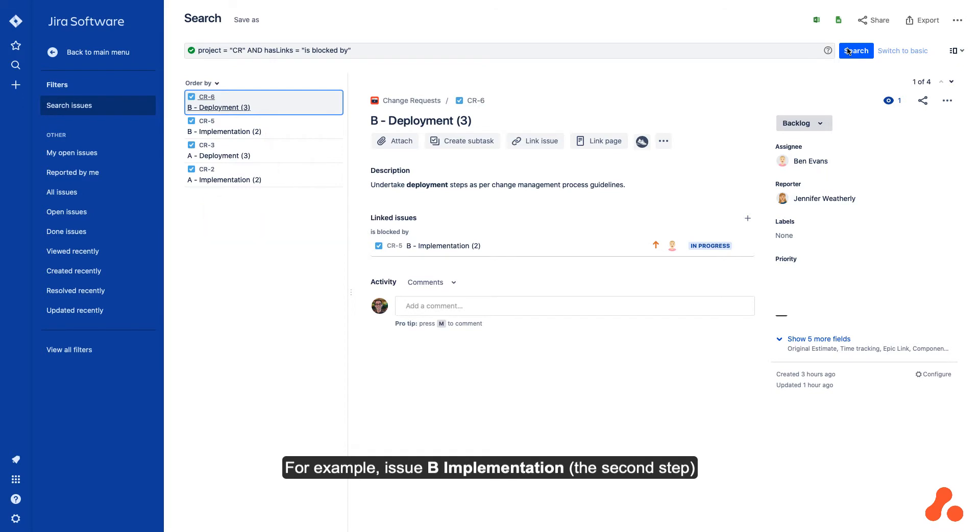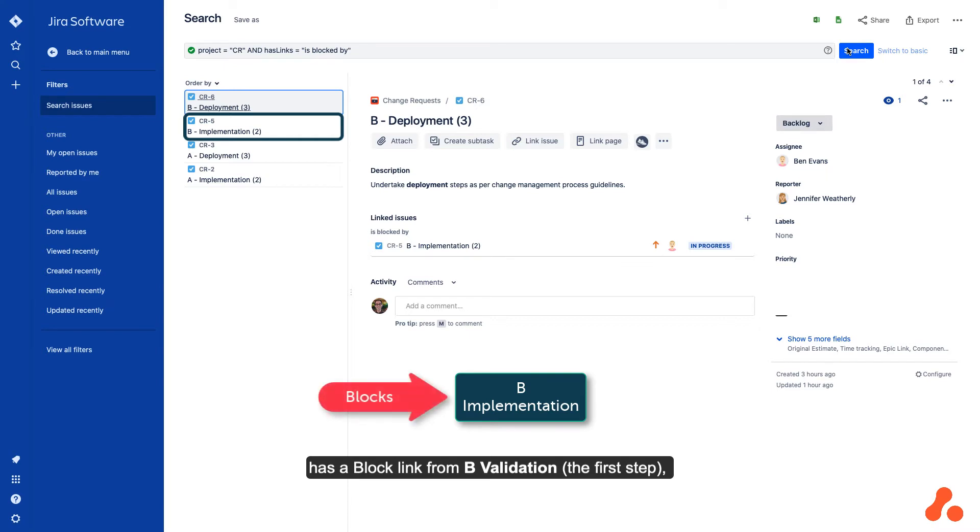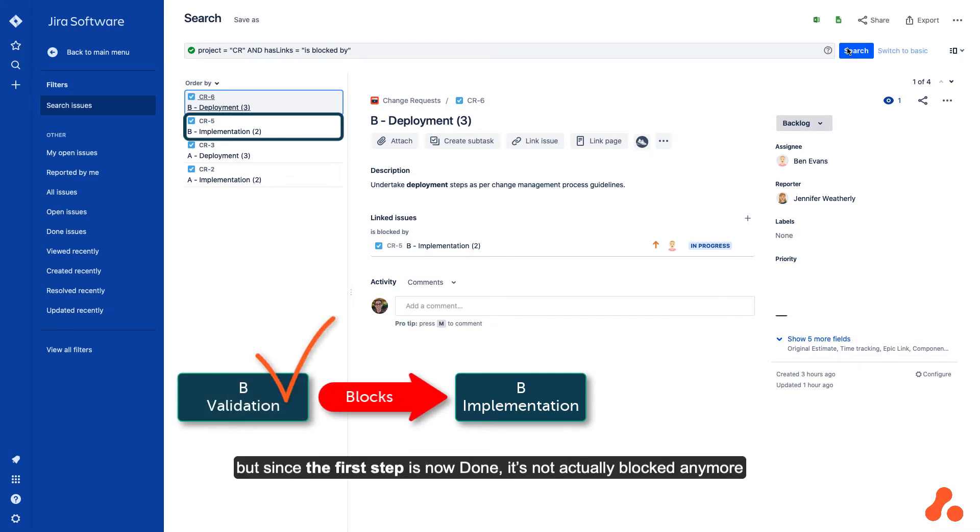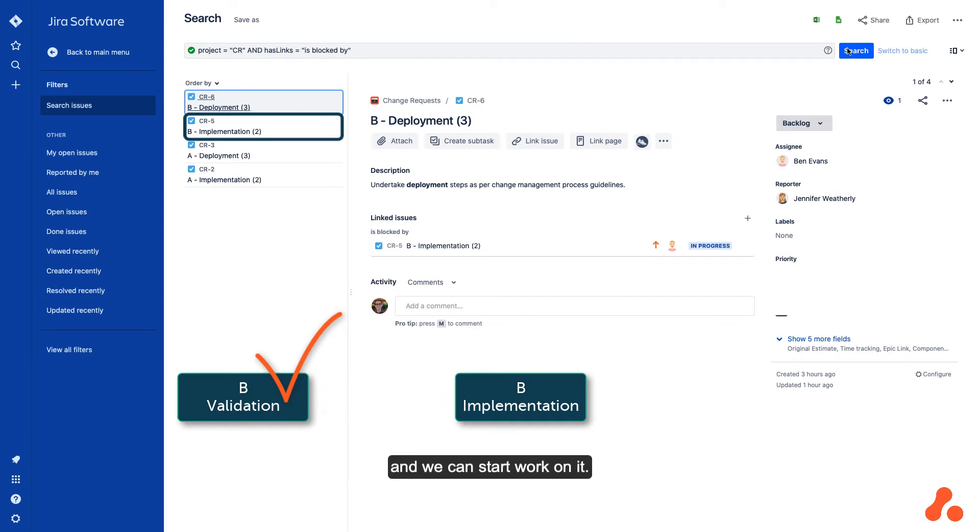For example, issue B implementation, the second step, has a block link from B validation, the first step. But since the first step is now done, it's not actually blocked anymore and we can start work on it.